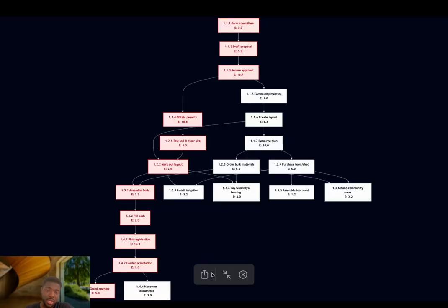How does this compare to the Gantt chart from the last assignment? The Gantt chart is much better for visualizing the schedule. It's a communication tool. It's easy to open in a weekly meeting and see what the team should be working on in week three, for example. The PERT chart is terrible for that. You can't tell what day it is, and it's not meant to, to be honest. It's just a planning and analysis tool.